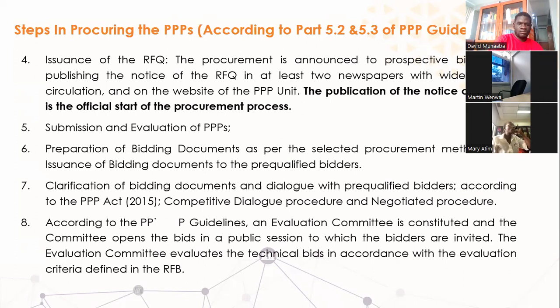Then we go on to submission and evaluation of PPPs: the preparation of the bidding documents as per the selected procurement methods, the issuance of the bidding documents to the pre-qualified bidders, clarification of bidding documents, and dialogue with the pre-qualified bidders. According to the PPP Act, that would constitute the competitive dialogue procedure and the negotiated procedure.